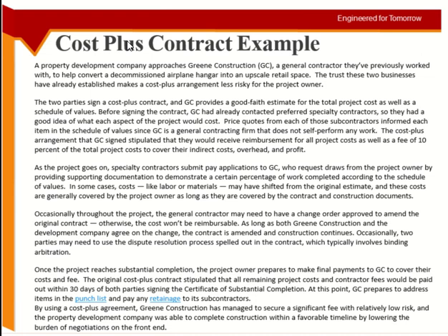So the point is, even in this type of contracts, you need to gather initial data yourself before you sign for this type of work. Okay, and the point about a specialty contractor is, he has people who can do this sort of work, who deal with airplane hangars and airports and so on. But the company itself is a general contracting company. They are not a specialist, so they are hiring other people. Okay. So they have said that they are going for the total cost plus 10% will be their fee. Okay. What else?